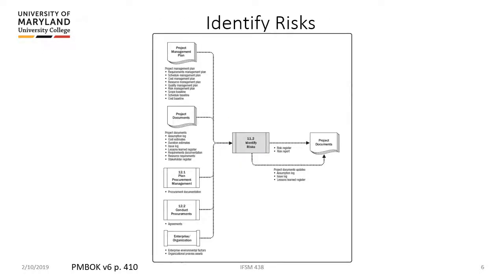So first thing we have to do is identify risks, and there's no magic to this. This actually is where you sit down, you look at each of the tasks that you're going to do from the highest level to the lowest level, and you have to, using expert knowledge and input from experts and other members of your team and so on, determine what your risks are. There's no magic to this, but it takes a lot of work, because you could just hand wave it and say, oh, well, there's just a couple of risks, here they are. Or you could really spend some time looking at all the possible risks, cataloging them, and then actually determining what you're going to do with those risks.